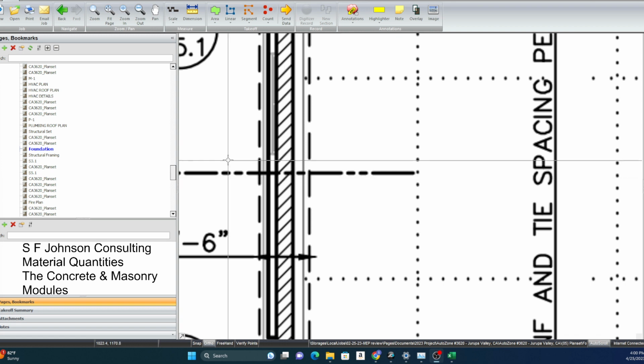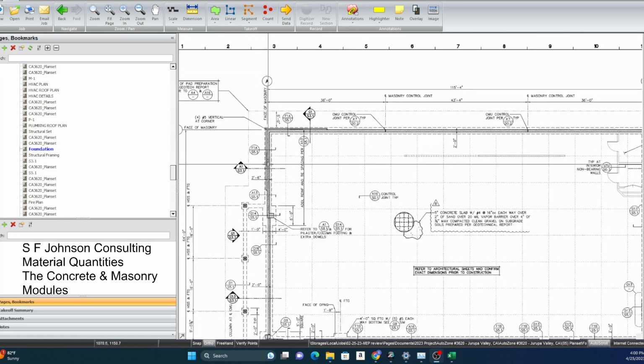If you are a concrete contractor, this is one of the things we show you in our concrete and masonry estimating modules, where we give you increasingly harder foundations to build the estimates for, and help you with the three-step process. The first step is the takeoff, which will help us with the material quantities. Anytime we're doing the takeoff, you should always be performing your material quantities as well, so you can pretty much kill two birds with one stone.